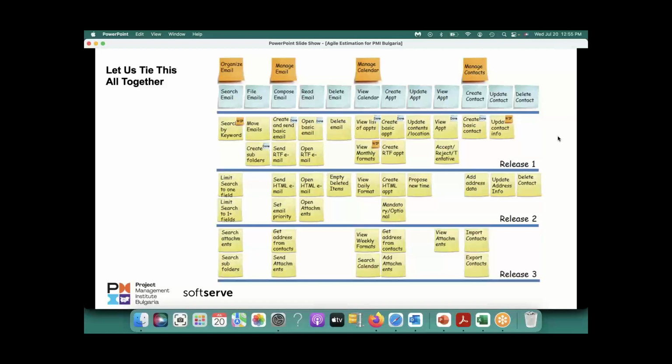At the end of 6 months, let's say 10 more got added, so it's 60, and the team delivered 40. But guess what? Those 40 are the most important, valuable requirements that got delivered. The remaining 10 out of the original 50 might be bells and whistles, very little value, and if they were not delivered, that's fine. Of the 10 you added, maybe 5 were very important, so they got delivered, but the remaining 20 did not get delivered.